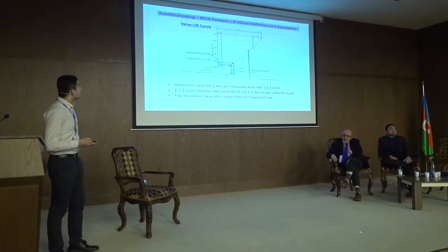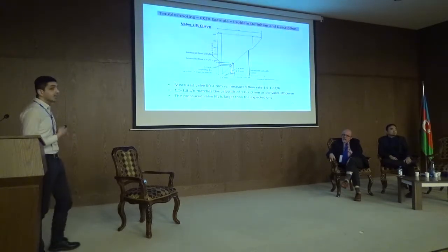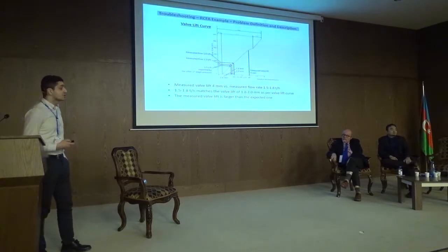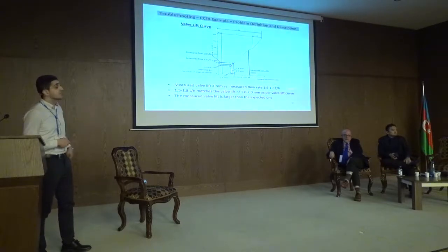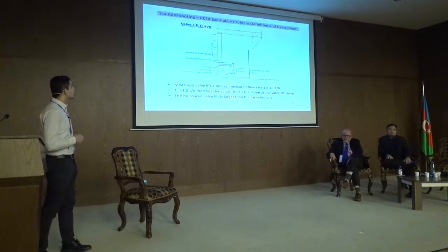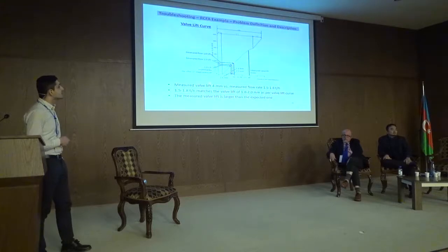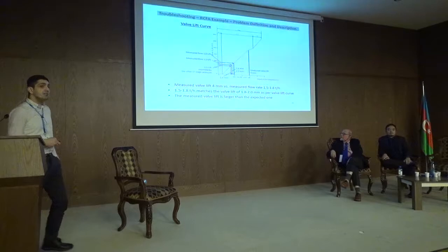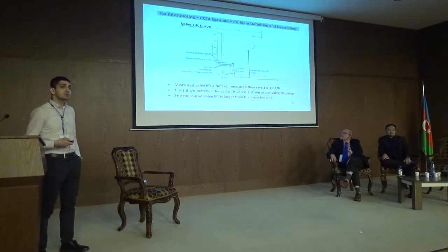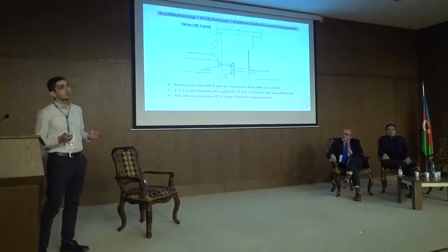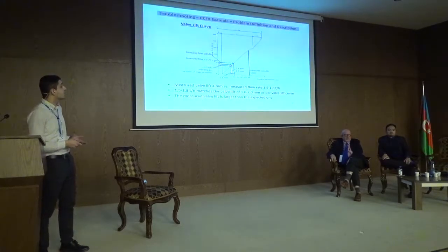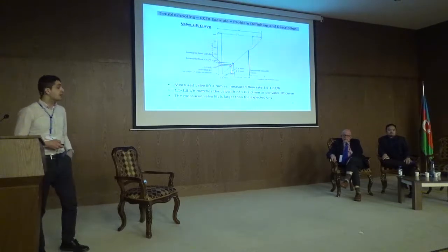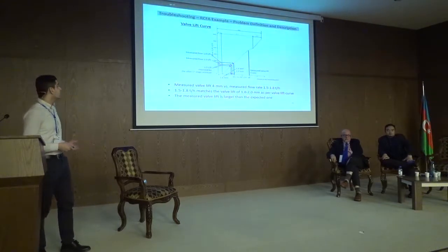Here we have the typical expected valve lift curve from the manuals, from the data sheet of this specific steam turbine. Here the steam flow rate is plotted against the valve lift, as you can see. We did a turbine solo run test, because before we can do the MRT, the mechanical run test, and connect the coupling, we have to do a turbine solo run test. We have to ensure that the turbine is in a good condition.